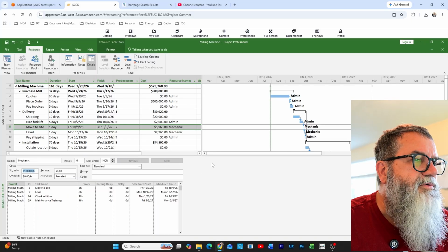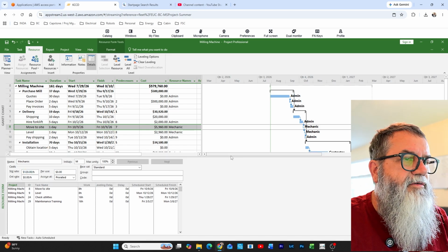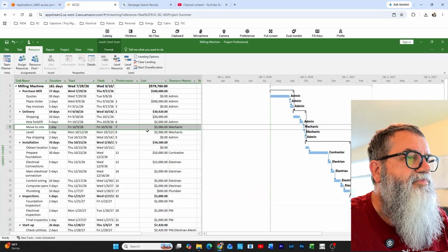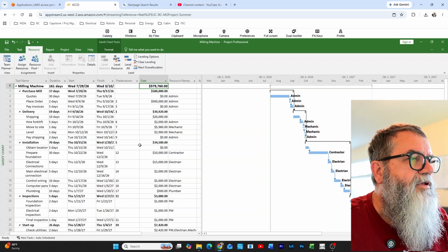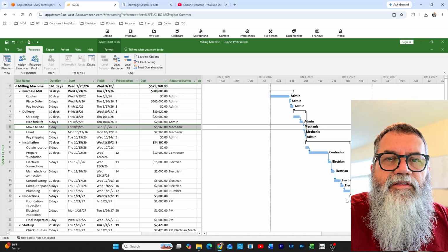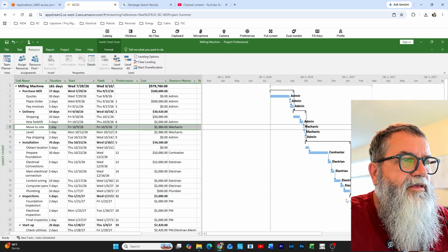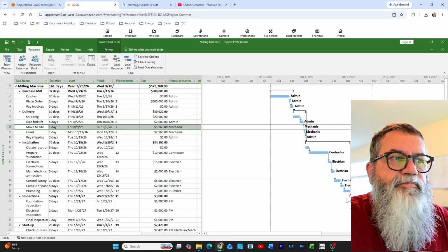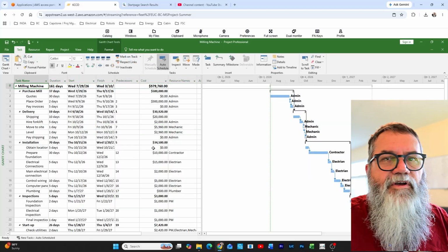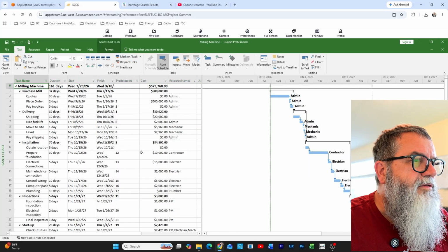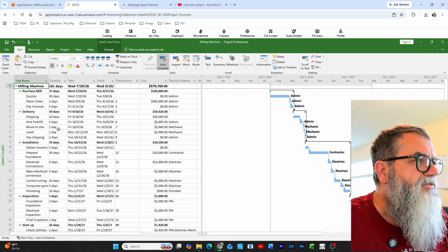And let's see what happened. So when I opened that window, it did a split screen, and I can just double click here and get rid of the split screen. But something's changed. I'm not at 574,000 anymore. What it's done is it's taken my costs that I entered manually and it's added a cost for the mechanic at $960, and it's increased my total cost. Okay, so my cost has changed, because I added dollars in for the mechanic.